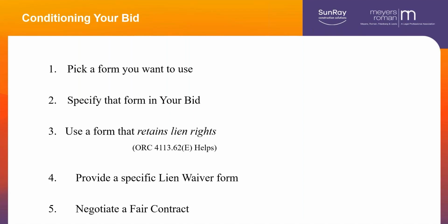Section E says that if you have a conditional payment process in your contract, you cannot also have an enforceable waiver of mechanics lien rights. So if you have a pay if paid clause, they can't also keep you from filing a mechanics lien or filing a bond claim. That's helpful, but you have to look at the other things too, such as in that same paragraph with the waiver of your lien rights, you're often